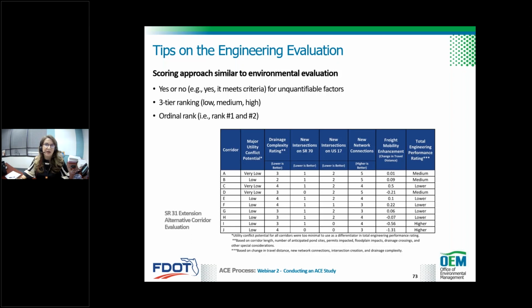In other projects we researched, user benefit analysis was used to capture the economic benefits of the improvements compared to the alternative corridors and how much they cost. So consider providing that type of analysis when it makes sense. Sometimes the best corridor is also the most costly, so you want to get that perspective as well.